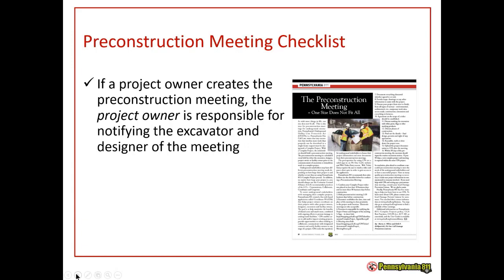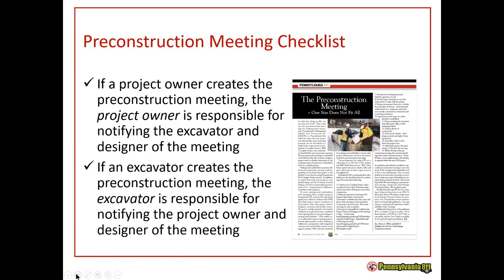So if the project owner creates the pre-construction meeting in Coordinate PA, then they're the ones responsible to notify the excavator. And likewise, if the excavator creates the pre-construction meeting, then they will be responsible for notifying the project owner and the designer for the meeting.